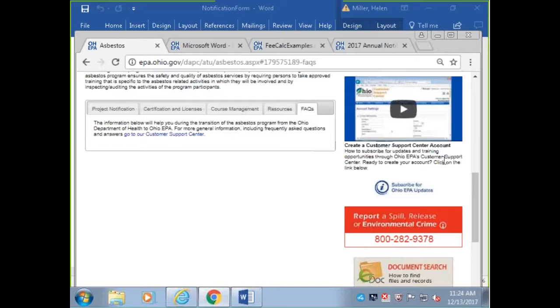Lucas County Land Bank question again, Allen County, et cetera. They've been awarded 5 projects, but only 2 are over 50. Do we still have to notify for all 5? You have to notify for all of the projects, or all the addresses under that project. So you'd have to notify for all 5. Now maybe only 2 of them will get charged a licensing fee. The other 3 that are under won't get the licensing fee. But you do have to still put them on a notification because they're part of the project. That one we'll answer separately.